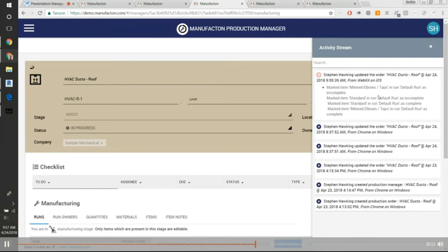So as something comes out to a job site and as something is scanned into a particular laydown area, we can see exactly who scanned it in and where it was scanned in at, really relieving some of those pain points where you have a box of, let's say, elbows that come out to a job site and you can't seem to find them anywhere. Well, this will help you source those or hunt those down a bit faster and reduce any sort of reordering or just delays to the project schedule.